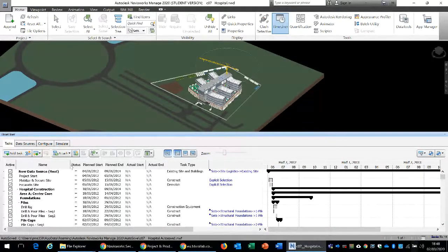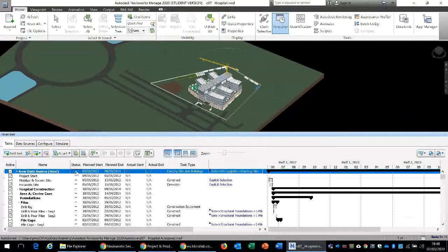So you're already familiar. Now this is the status column, which basically indicates what is the current status. So the suggestion is we are not using it merely for planning purposes, but also for monitoring purposes. So this is the plan start or the plan end date, and we can also stipulate the actual start and the actual end date. So we could do some sort of monitoring.